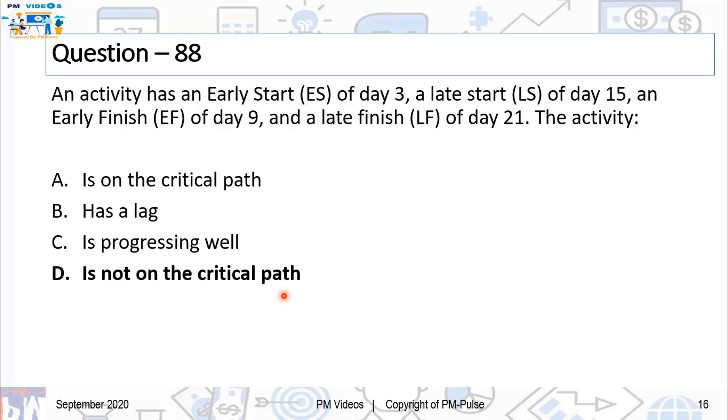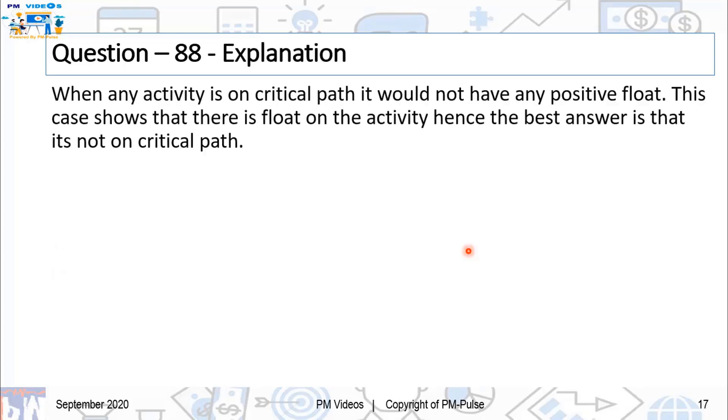It is not on the critical path because the value of float is not zero. Now, some people also end up answering has a lag. And that is because they confuse float with lag. So remember, this is not a case of lag. This is a case of float. So don't get confused. And the correct answer, it is not on the critical path.